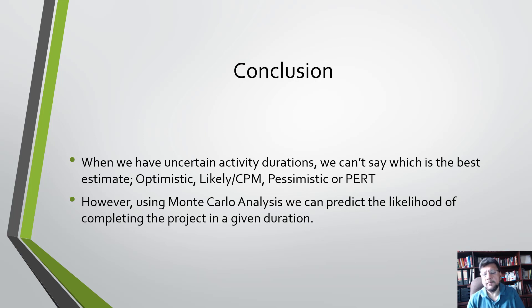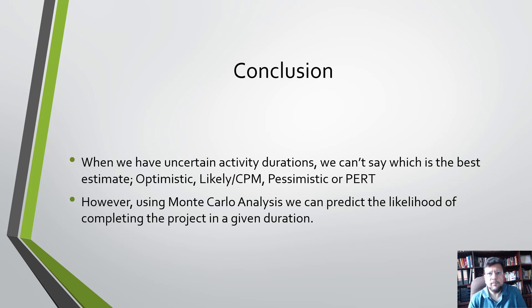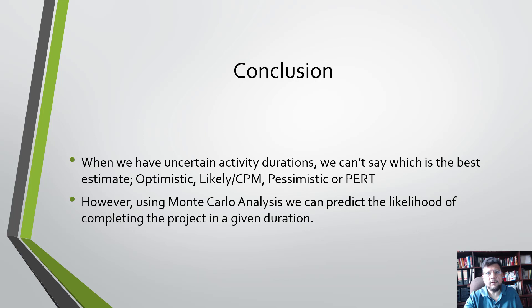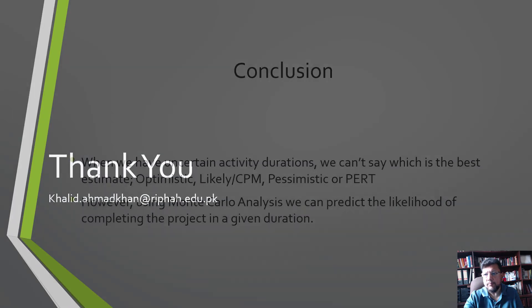You don't have specific dates, you have a date and a probability. So you have a set of dates and probabilities which represents the effect of uncertainty on the schedule. I have an Excel sheet with this which I will be posting in the comments area. You're welcome to download that sheet and try out some of these calculations. Thank you.